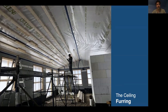So sealing the process between any penetrating pipes. I think we had a couple of vent pipes that came out on the backside in the corner. But we tried to keep everything minimized as far as anything going up through that layer. And then to be able to run any kind of electrical conduit or Romex or suspend anything, we put the 2x4s across the ceiling. So we dropped the ceiling down, and that made it a simpler step for people to do wiring and hang stuff on. Above the stove is the recirculating hood, so we hung it off that 2x member as well, and then just fastened the drywall to that. It also added rigidity to the overall truss system, and that made the inspectors happy as well.